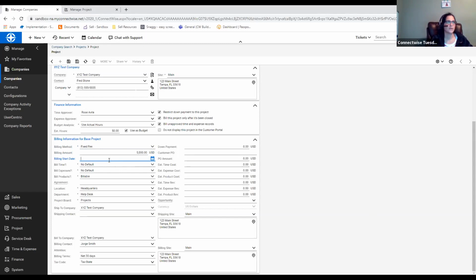If you say that my billing start date is going to be in line with my start date of my project being February 14th, the system won't send an invoice before then. So if I try and send like a progress invoice or like a down payment invoice off of the project, it's going to say I can't do that just yet. So make sure that your billing start date lines up with when you want to send your first invoice from the project, okay? So in this case, I'm just going to cover myself, and I'm going to say my billing start date is February 1st.